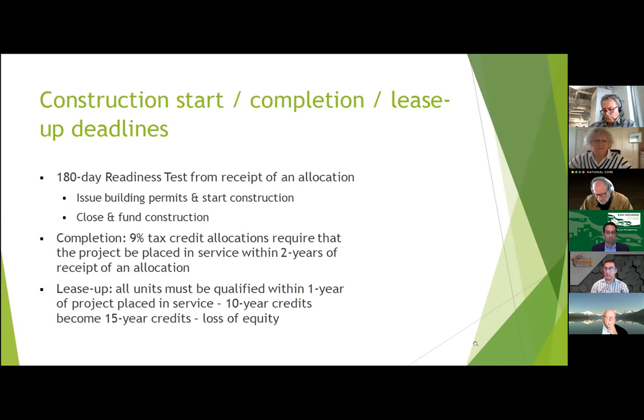Imagine I just step into any of the cities and say, here, I have 6 months to process my plans to get building permits. Remember that I have to go to my construction lender and my tax credit investor, who have to do a cost review at least 60 days before we close. Now it's 4 months.